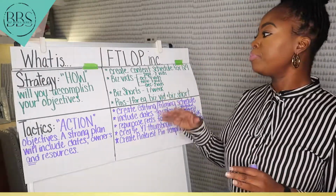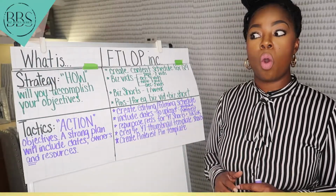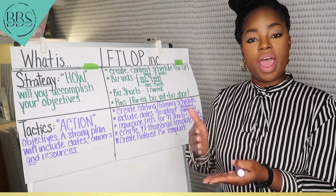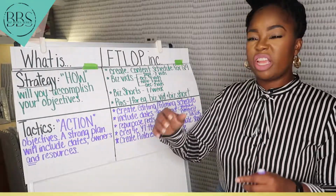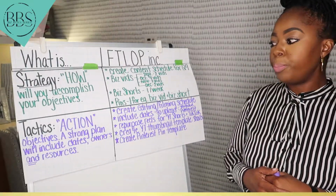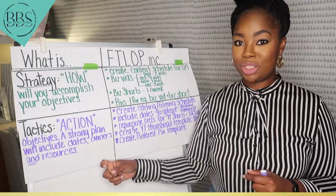Let's say I didn't put that together yet. I need to create a content schedule for both lifestyle and Biz Bites series. By when? It sounds great that you want to do it, but by when? You have to put a date, and then you can reverse engineer how you're going to get there, including any mini tasks to actually create that content schedule. You need to attach owners and resources.